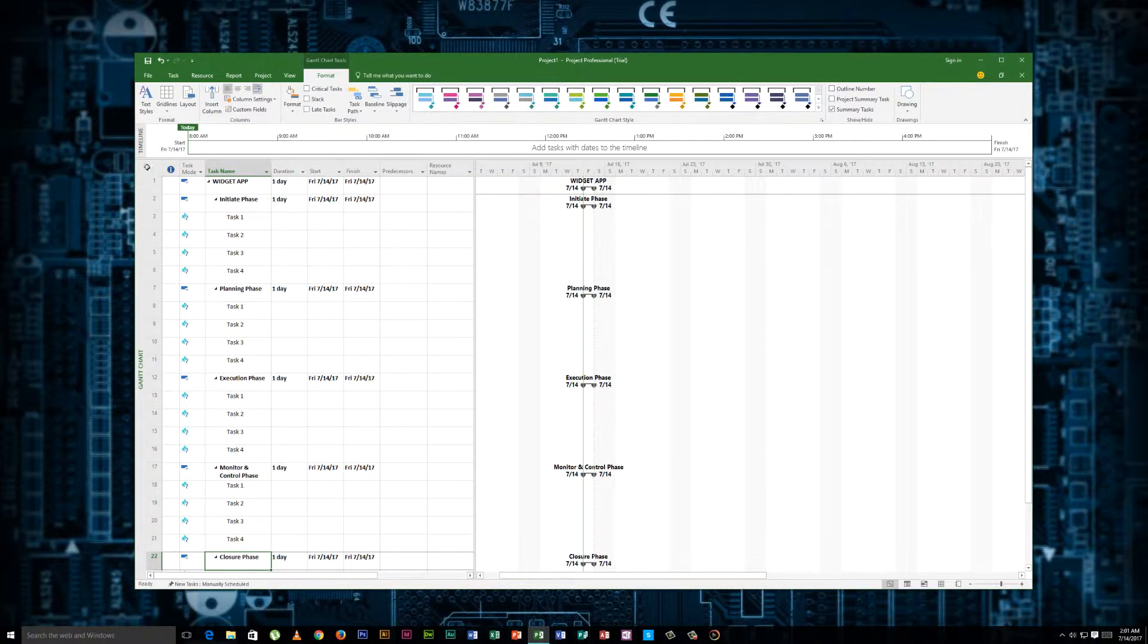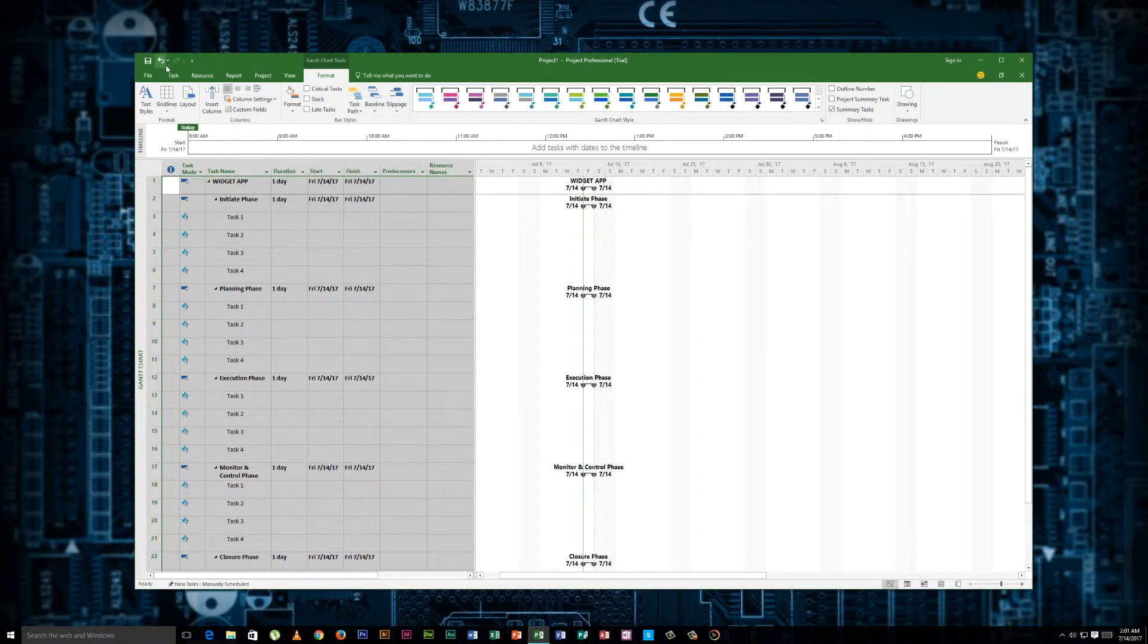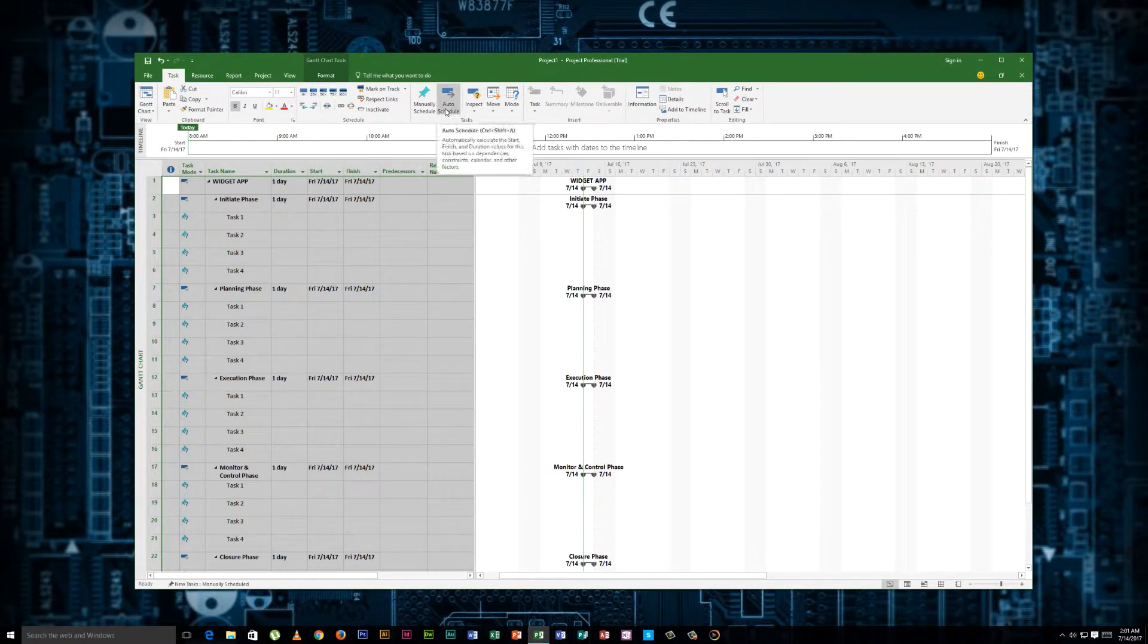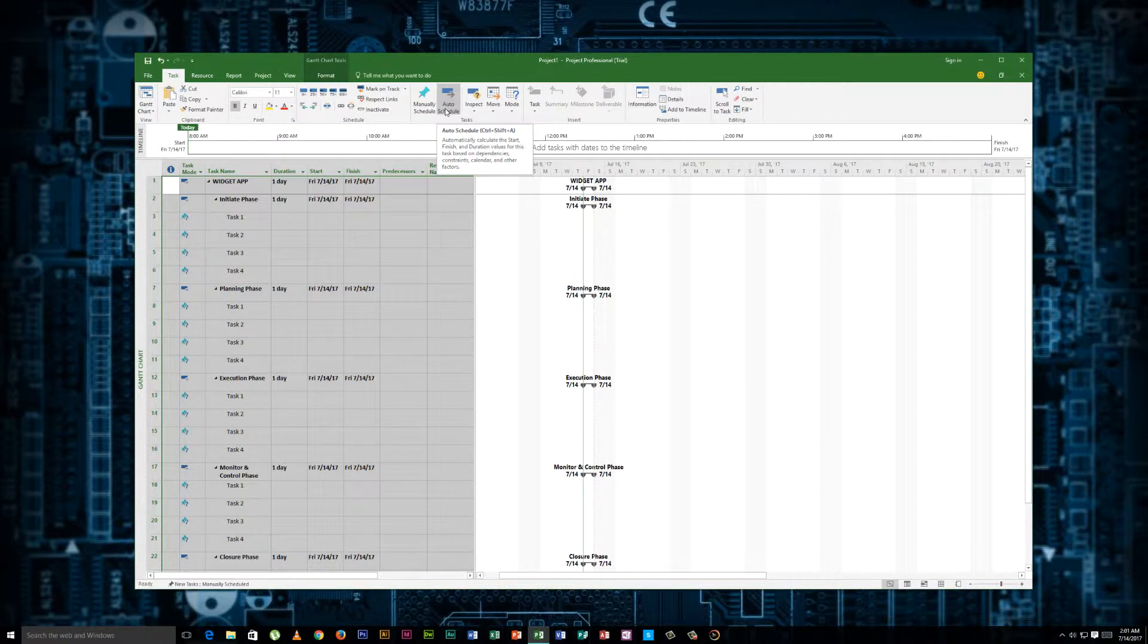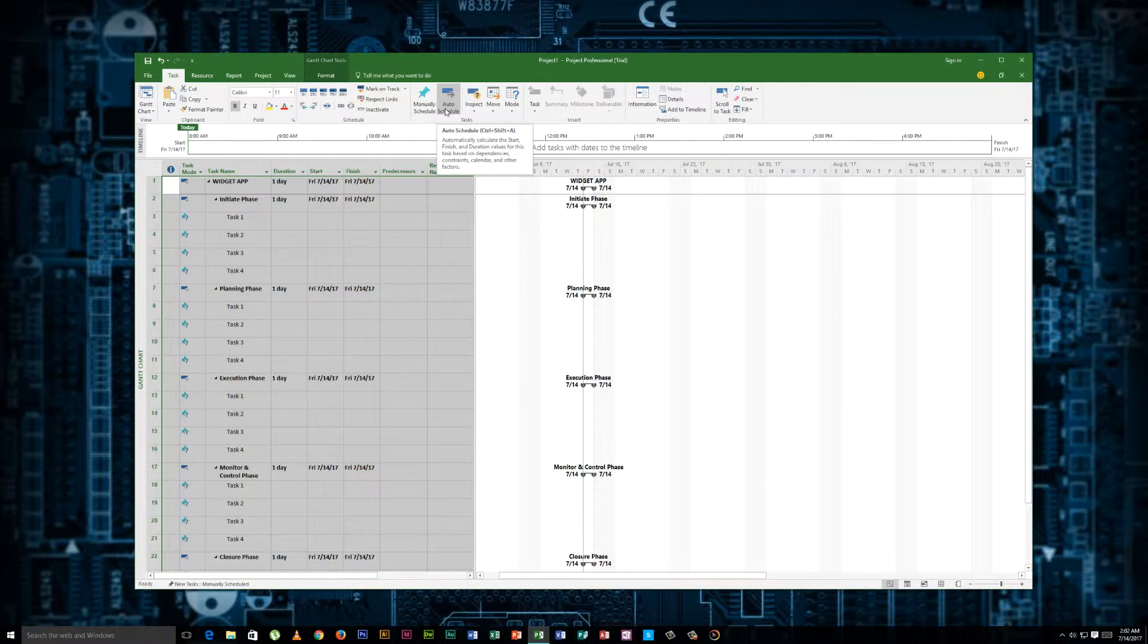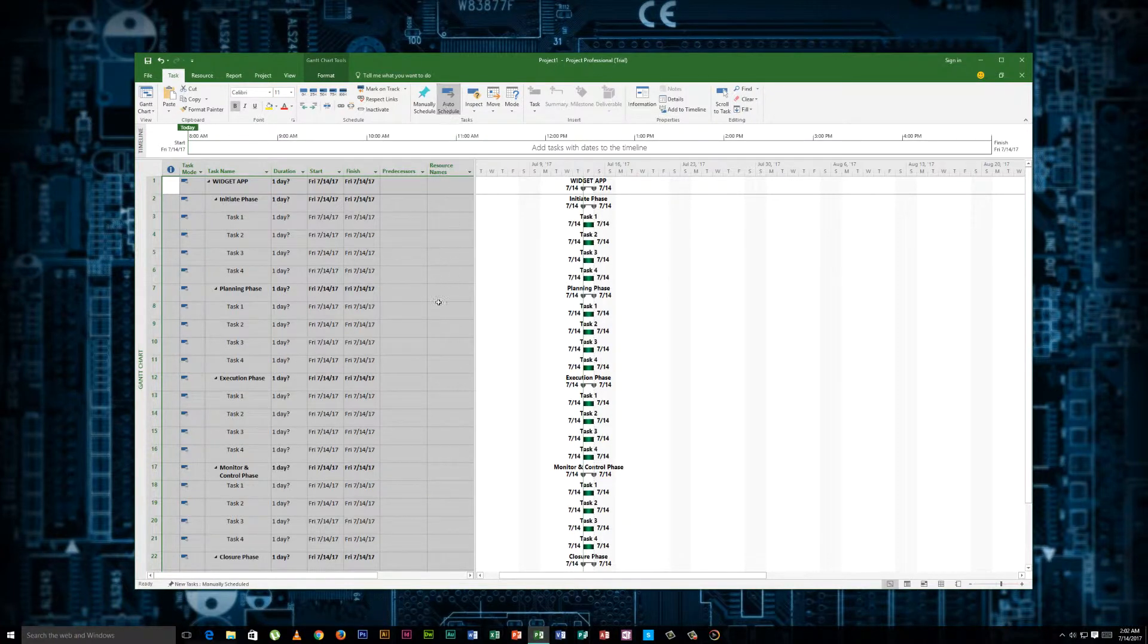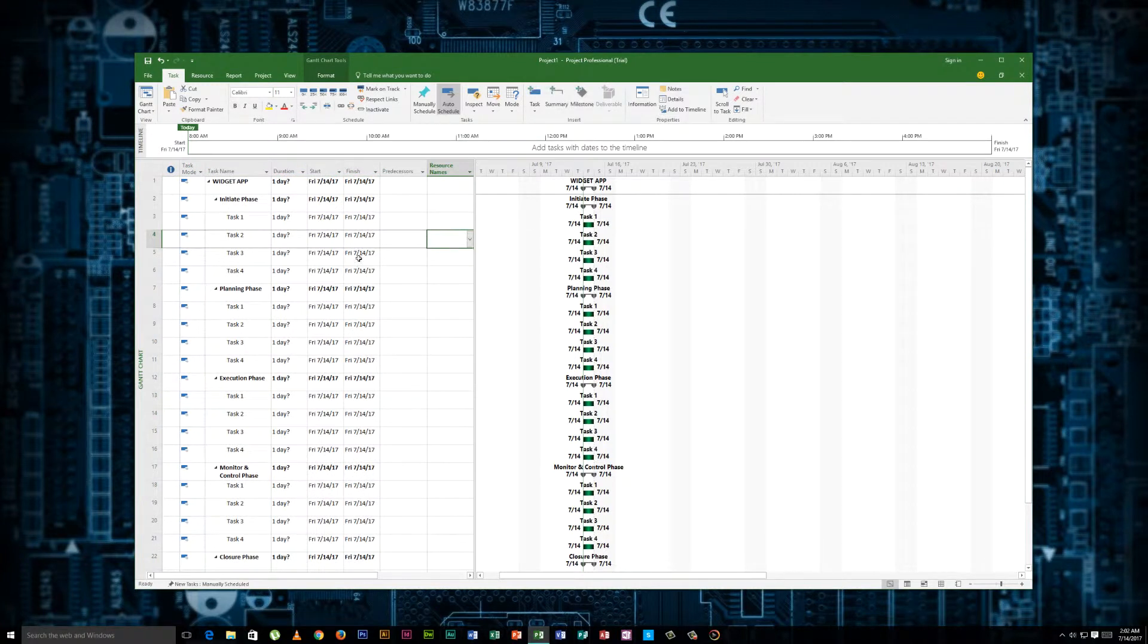Now, the next thing we want to do here, and you don't have to do these steps in this order, it's just things I advise that you do, is you want to auto schedule. You can use manual scheduling. But when you auto schedule, if you change one thing, anything that has a dependency on that will also auto update, which is really good. You really want to have that in place. So let's set auto scheduling.